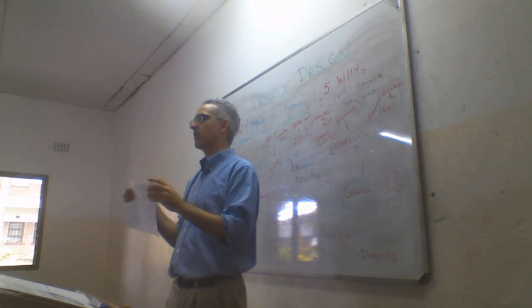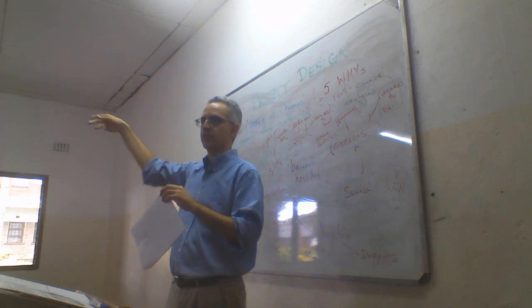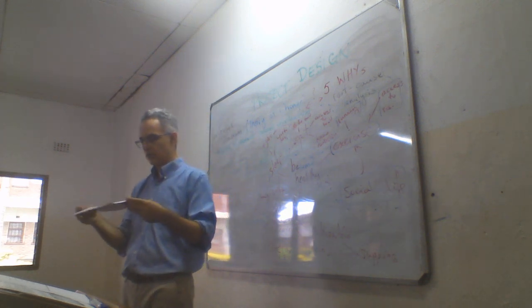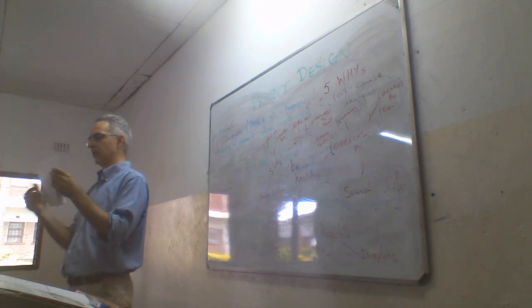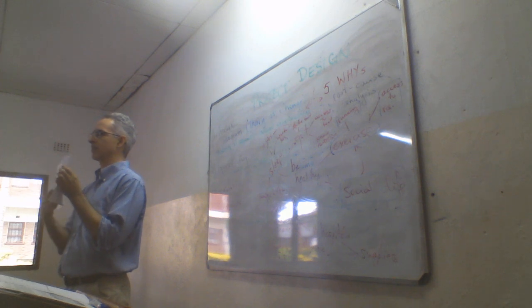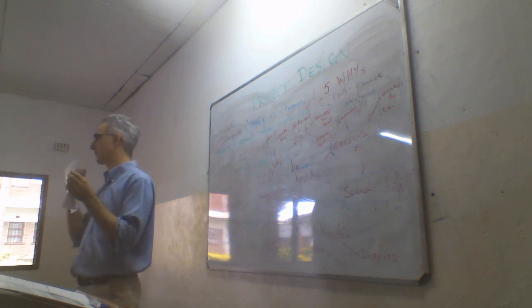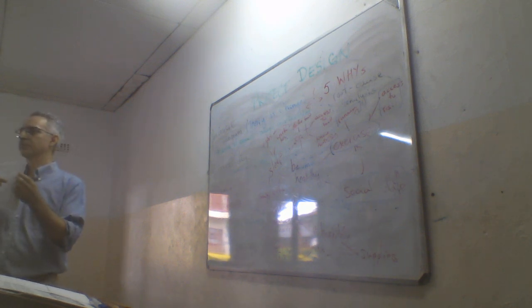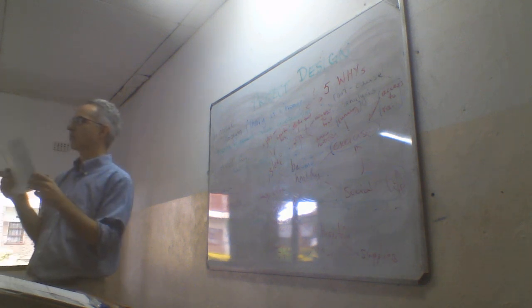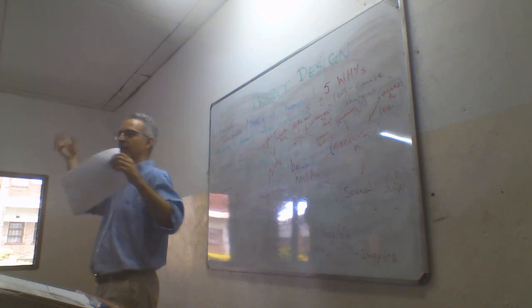So when we think about these arrows of causation, this causes this, this causes this, this causes this. When we go back to this logic diagram, the thing that comes at the end, the impact, does it cause the things behind it? No. Right? So everything else is a cause of the impact. So when you look at this diagram, you're looking for the boxes that have no arrows going out, only arrows going in.